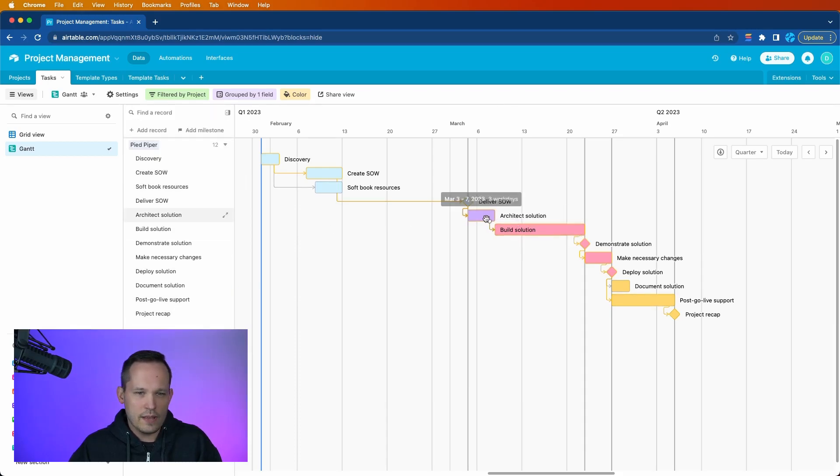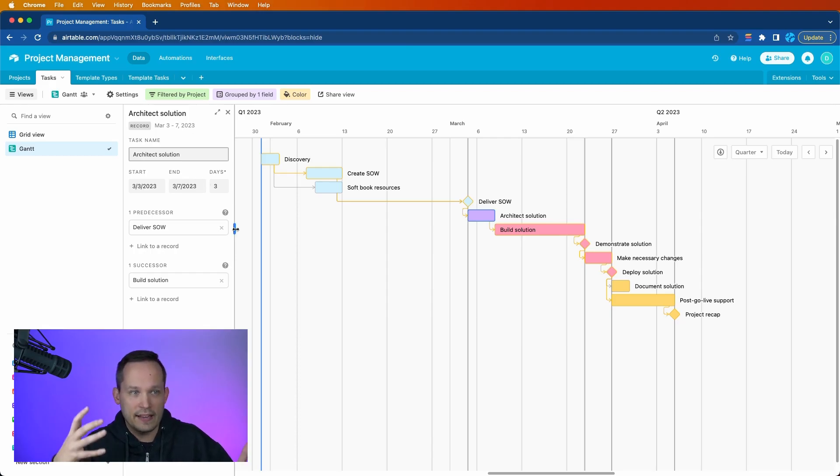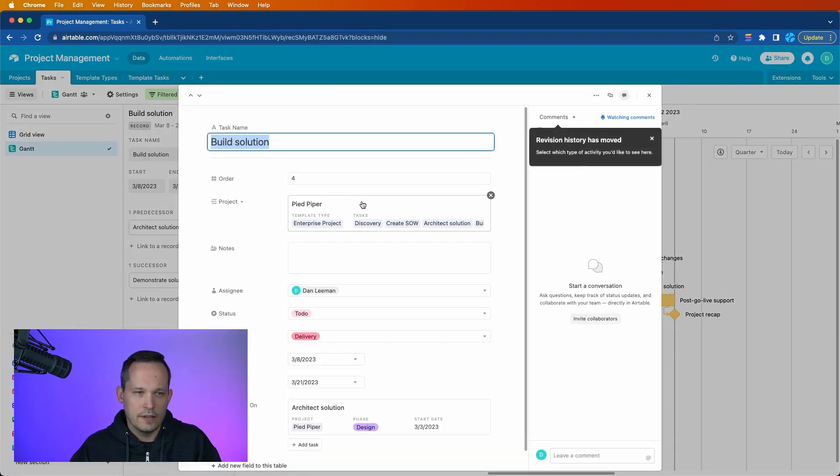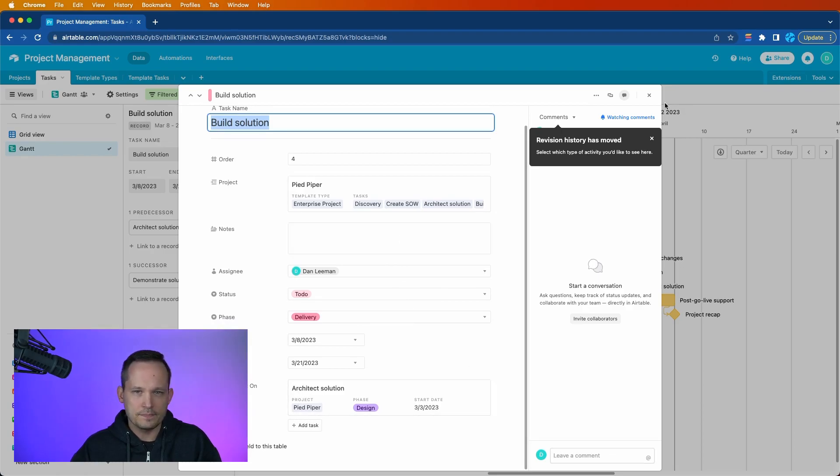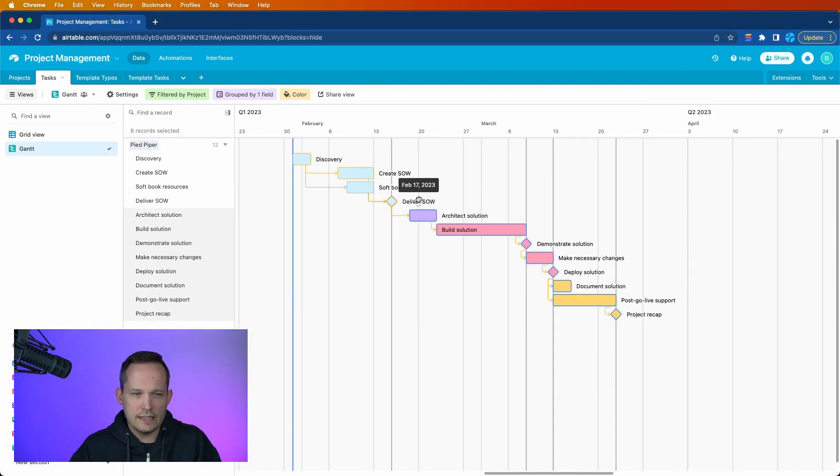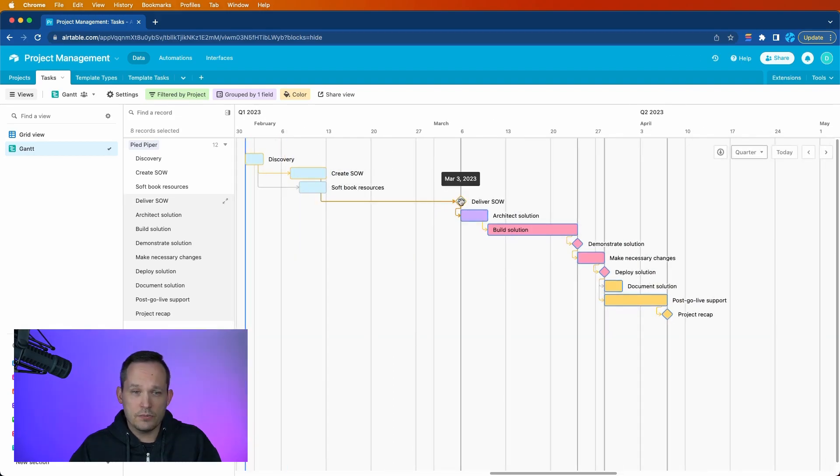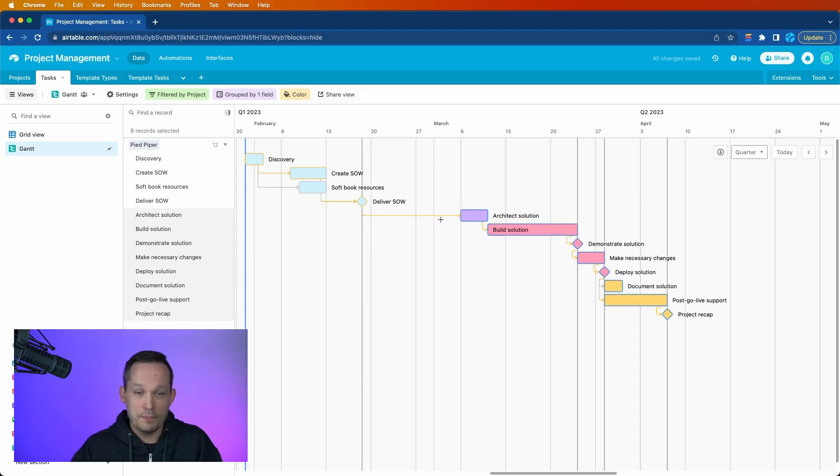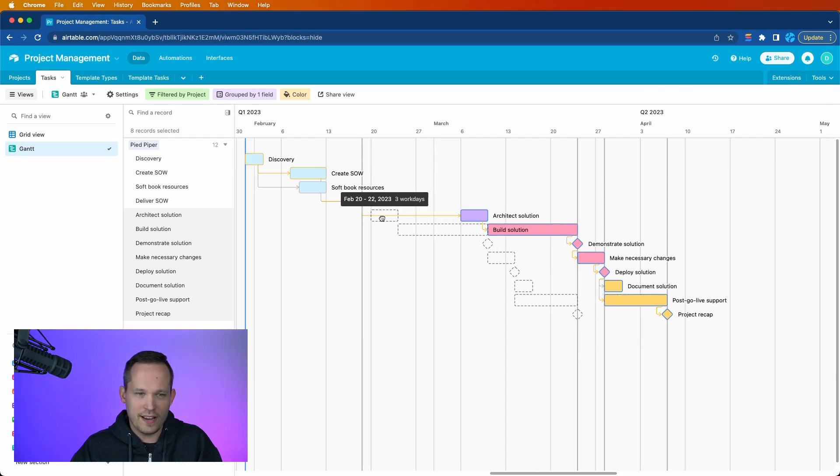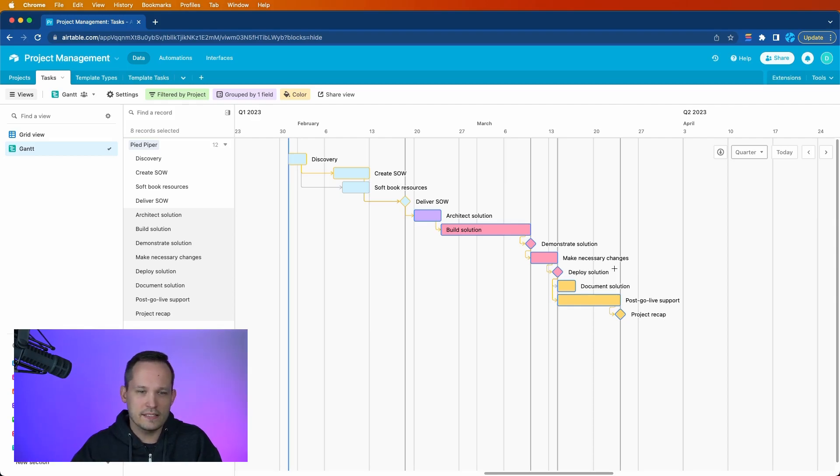Now, unfortunately, there's no way that we can just edit what this experience looks like. Let's say you had a description and you want to see, okay, well, what do you actually do for that step? This isn't the best view for enablement per se, but you can just double click an item. And it'll actually open up the record view for that particular task. So that's where you can see all of the other fields, notes that you've had, you can leave comments, and you've got a lot more flexibility on that front. One of the things that's interesting is if I did click something and drag it out, dependencies really only work the one direction. So if I were to then bring this back in time, it's not bringing all the other pieces along with it, because it doesn't need to. But here's a slick trick, you can go ahead and highlight all of these records, and click and drag them and they all follow along. So this is a really nice feature just built in that you can utilize to be able to move tasks in mass.